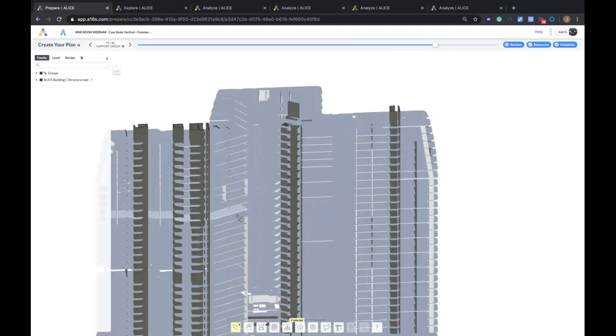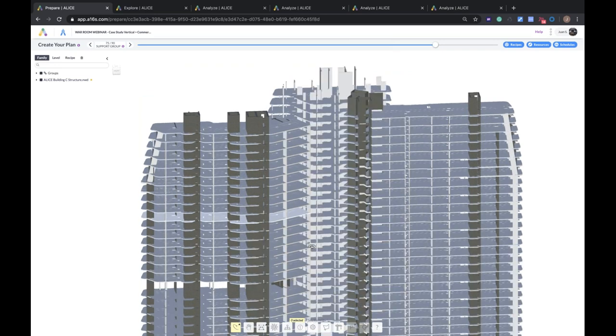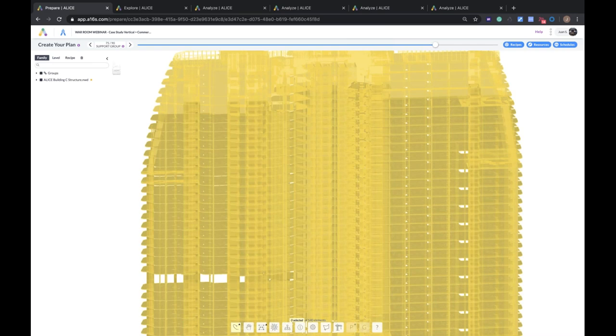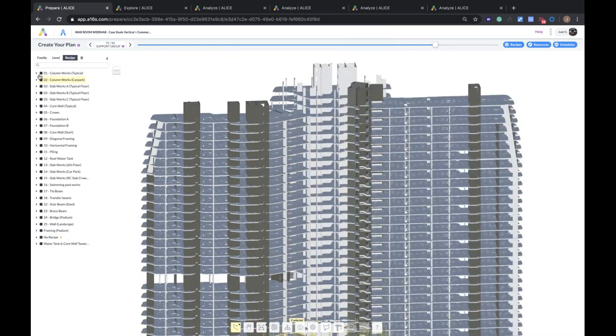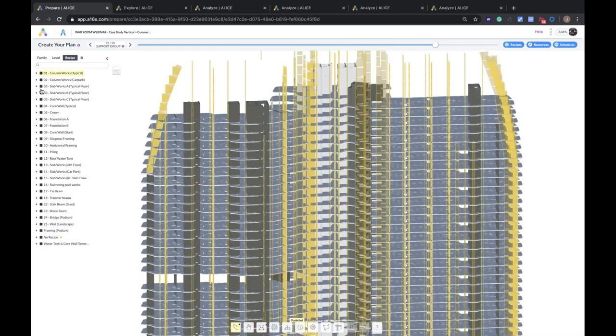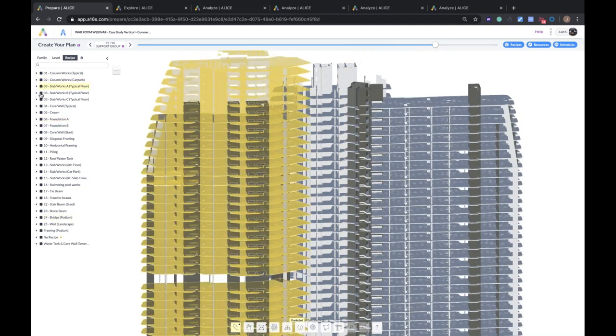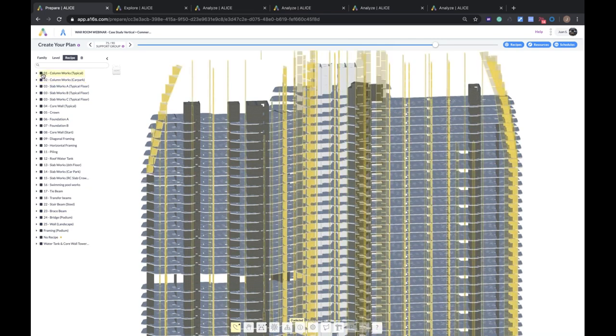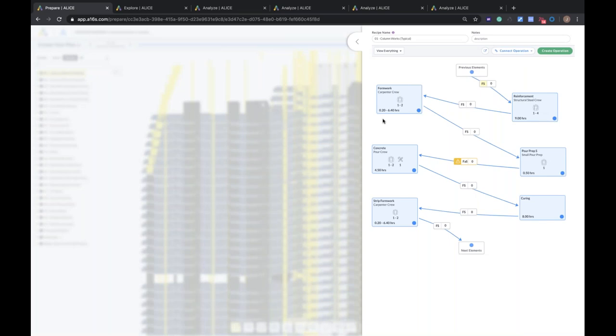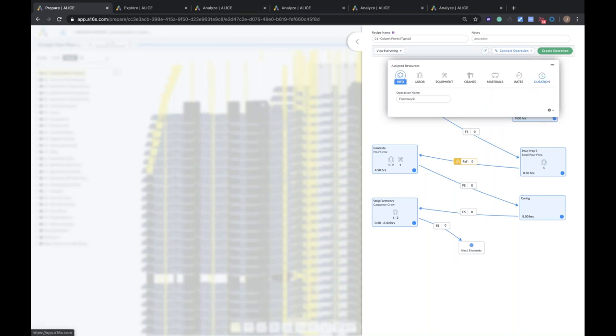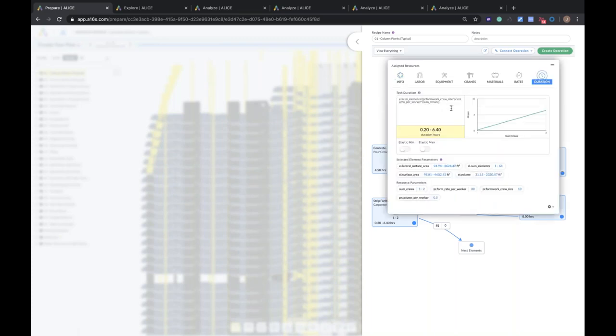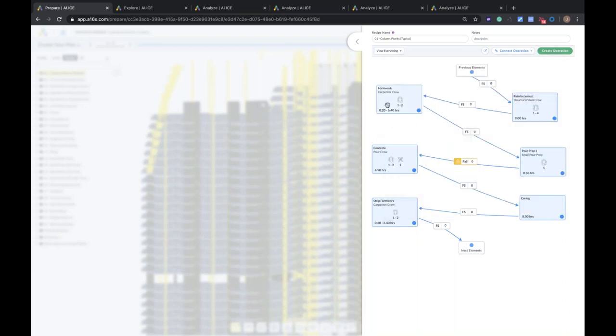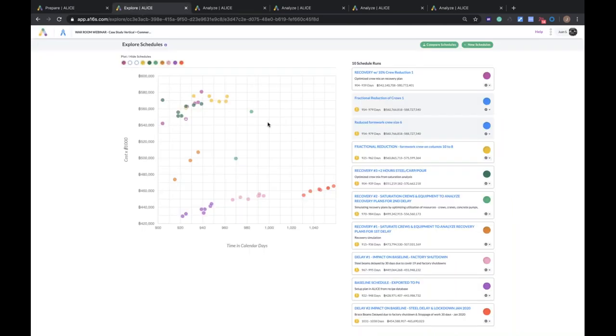Now, the analyze and the explore page are where you spend most of your time in ALICE, running schedules, looking at the analytics. The prepare page is where you actually set up your plan. You import your model, and you build your recipes. So you can see here that we've applied recipes for all the columns. We've got different recipes for the slabs. Here's a simple formwork recipe for forming and stripping the columns. Now, when we do a fractional reduction of crew sizes, how we were able to do that is actually by setting a parametric recipe, where we're looking at the number of columns that they can form, combined with the production rate of those crews, and the number of crews on the job.